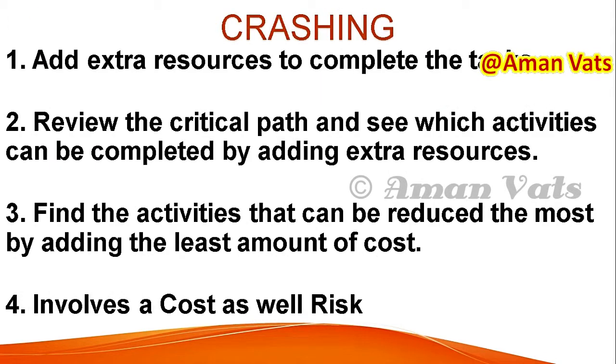So crashing is basically adding extra resources to complete the task. Review the critical path, and see which activities can be completed by adding additional resources. Find the activities that can be reduced the most by adding the least amount of cost. The cost is mentioned here because in crashing, in the initial stage the cost doesn't make a big difference, but when the activities are progressing and we are near closure, the cost makes a big difference. It is going to be really higher. You have to be very careful when you are going for crashing.